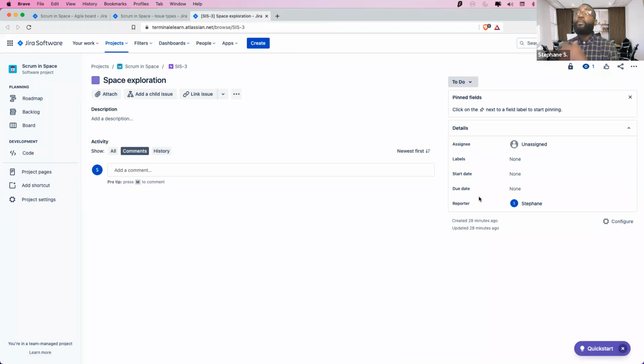Okay, but in our case, and most of the time in Scrum, you need the priority because that's how you prioritize your backlog. The product owner, at least, is prioritizing the backlog. And when you do the sprint planning, you're looking at all the product backlog items in order of priority. You want to start looking at first the top items, the highest priority. That's what you commit to, and then down to whatever you could do in terms of your capacity. Does that make sense?